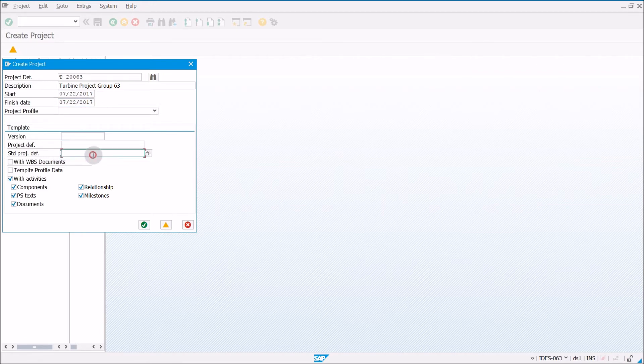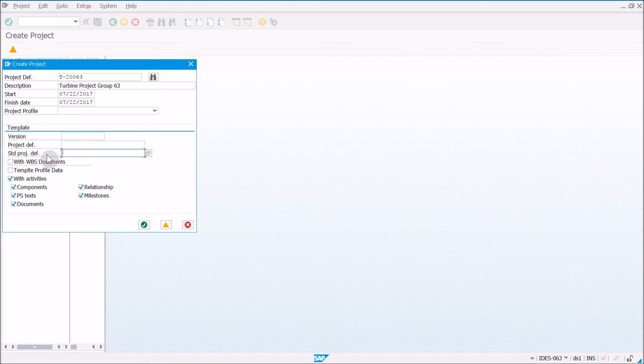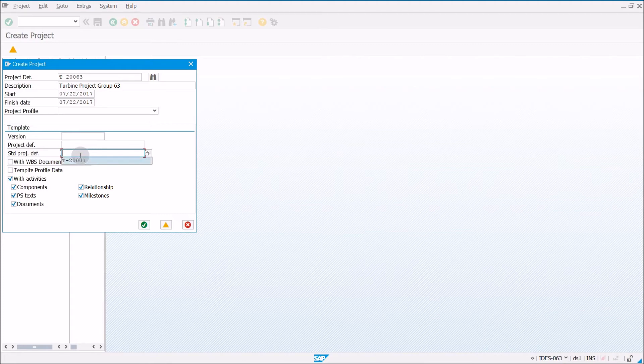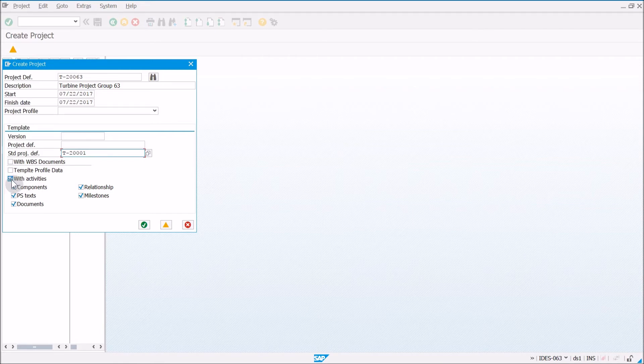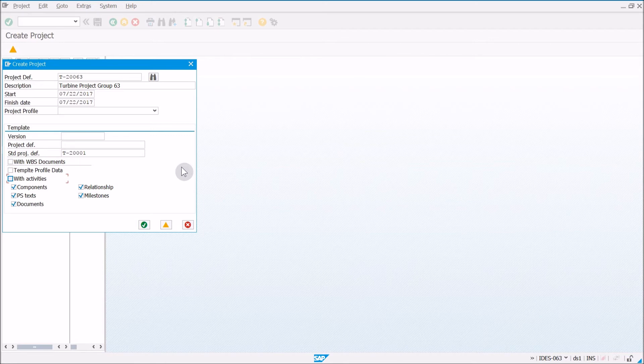And then we just have to go down to Standard Project Definition. This is going to be the actual template that we're grabbing. So anyone doing this exercise will have to use the same template if you're following along. So instead of putting your two numbers here, you're going to type this out exactly with the 0 at the end, because everyone who will be doing this should be using the same template. Then finally, you want to uncheck with activities. So we're going to be creating our project without any of its activities, because the next exercise, I'll be showing you how to create the activities in the project using a network template.